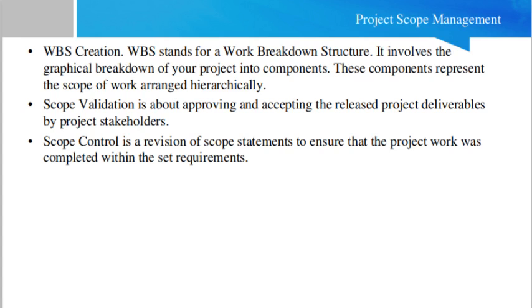So as per scope control, you will tell the customer that if he wants to add 2 more modules, it will be considered a change request. Scope control means you keep a close eye on the scope document and have a clear vision about the scope, and as per the scope you control the execution of the project as well, and take action as per the change request where necessary.